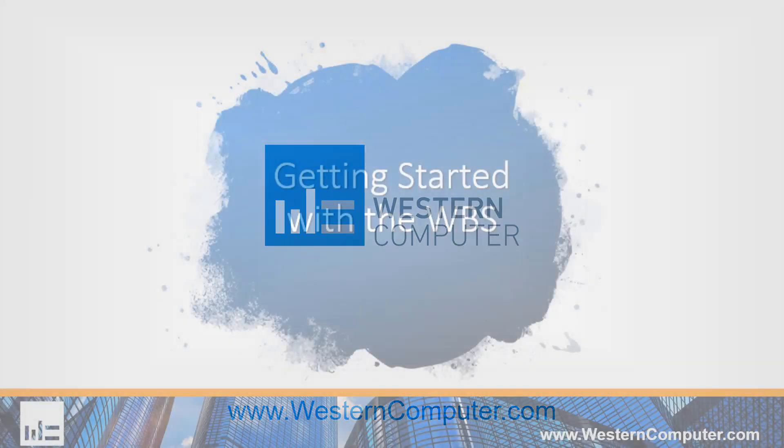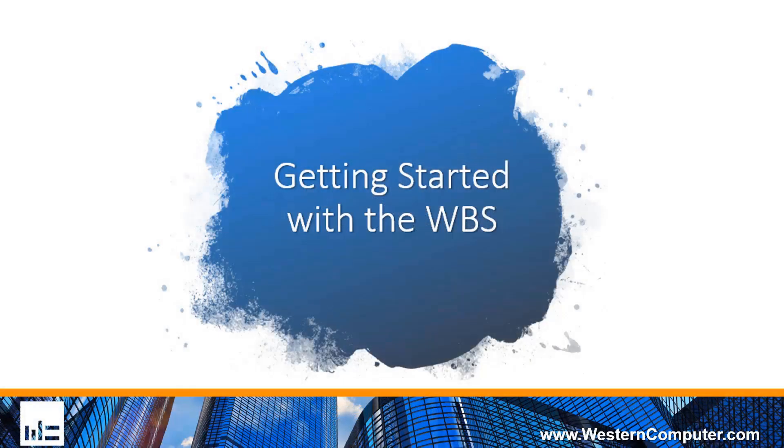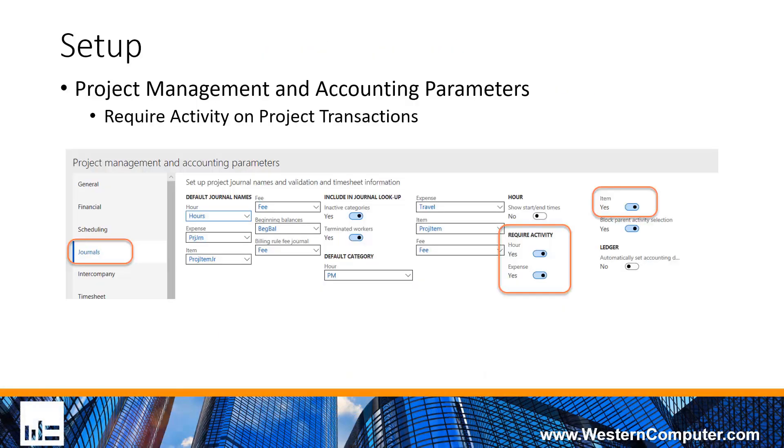Hello, everybody. First thing to know about the work breakdown structure in Dynamics 365 is that in the project management and accounting module, it is represented through the activity field on a project transaction. Within that project transaction, there's the activity dropdown list, and that is the window into the work breakdown structure.